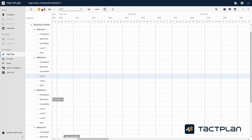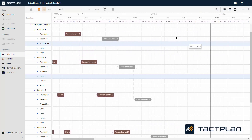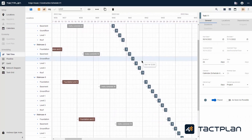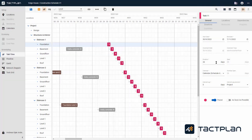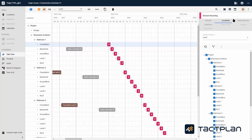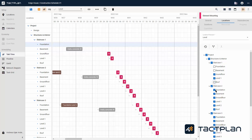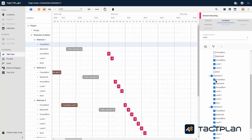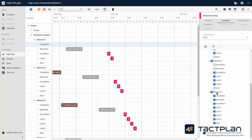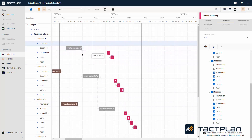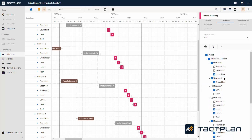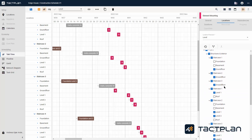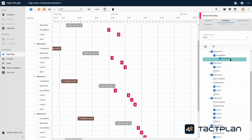Now Precast Concrete Element Mounting needs to be added. Element Mounting appears on a large portion of the levels. You select Add Mode again, keep it on Add to All Locations, and choose on which location level the task must be added to. When you add it to the schedule, the task is defined on all the locations on the precision level. In Element Mounting, one level is made at a time — one staircase is made at a time. So to change the order in which Element Mounting is done, you must open the side menu and go to Locations. Here you will find the locations in the order in which the task is made. To change the order, go down to Staircase 2. Click on Ground Floor for Staircase 1 and pull it up under Ground Floor on Staircase 1. This way concrete elements for one whole floor is made across all staircases before moving on with the next level in the building.